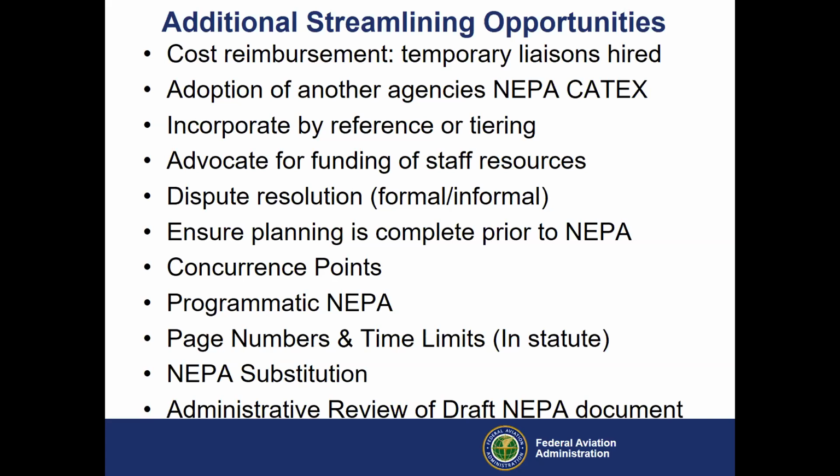I just sat in on a training by the Interior's Bureau of Ocean Energy Management. They're utilizing it a lot. Interior as a whole is. So NEPA substitution looks like it applies more to the Section 106 process, where we aren't going to necessarily seek concurrence from the SHPO on, let's say, a no historic properties affected finding, but we're going to go through the NEPA process, coordinating with the SHPO on the whole project, doing our required cultural reviews, and then put a draft environmental assessment out and circulate that to the SHPO as well.